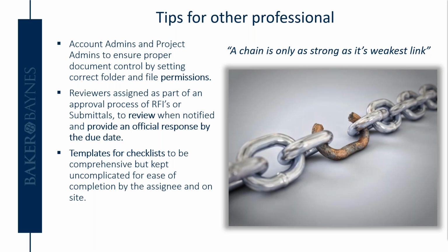Then reviewers, for example, your architects and engineers who were assigned as part of an approval process of RFIs or submittals, need to review these when they are notified and also provide an official response by the due date in order to ensure that the required information is then communicated back to site as soon as possible.